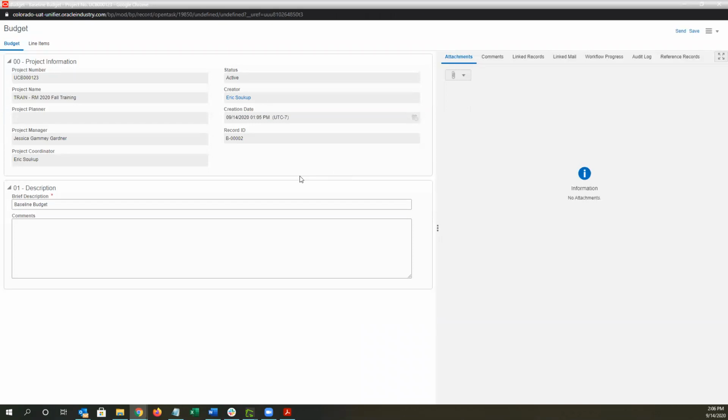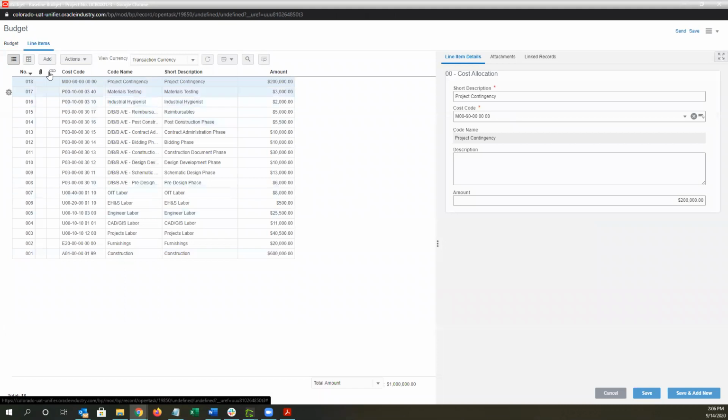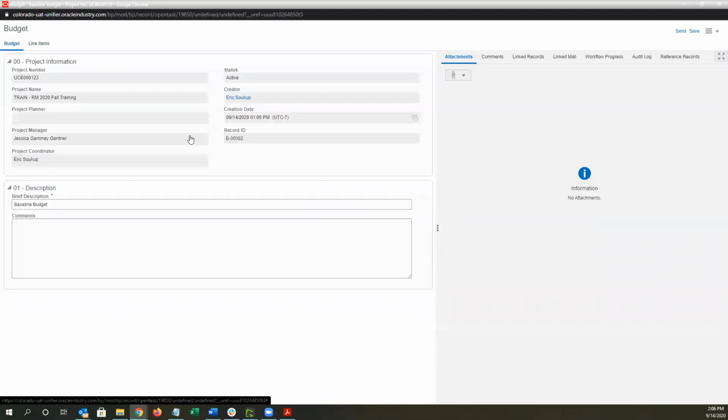So we have this budget verification step because once your budget's baselined, it's stuck. That's what we're using to report against. So we want to make sure that we give you every opportunity to validate that you've got the right numbers in here. I know it can feel a little bit repetitive and redundant to keep sending it to yourself.